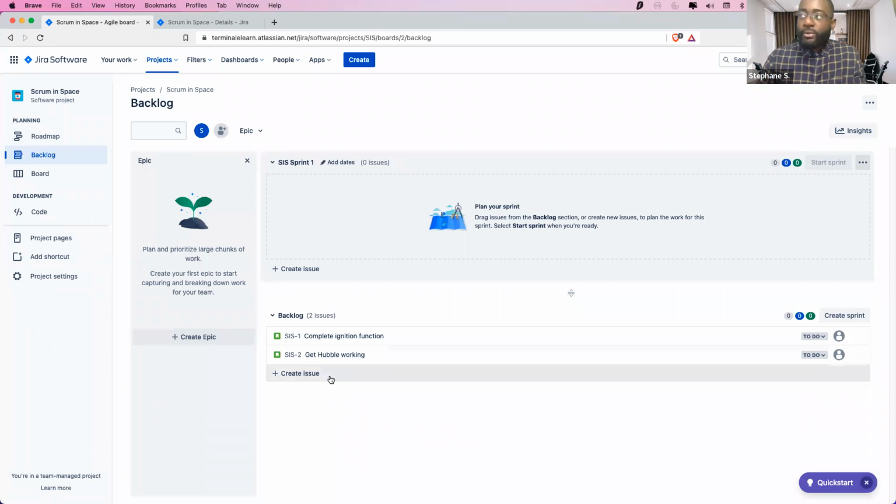That's for the story. So in the backlog, you're going to be creating and keeping stories, but you can also create epics. But the epics are going to be filtered not to appear directly in the backlog, because the backlog in Jira is going to hold your stories, your bugs, your tasks, or your spikes. But they have a different treatment for epics, which are bigger stories or umbrella stories, higher stories. They're called epics. They have a way of creating that, and you can do it here, right?